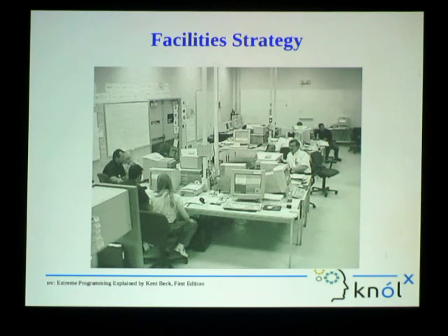Yes, because generally what you see is that those stories or tasks are actually arranged in priority order, and they should be. It means the client wants feature, story 1 or task 1, to be completed before task 2. And they can even change the priorities within the sprint. Putting one ticket over the other means it has more priority. Exactly.